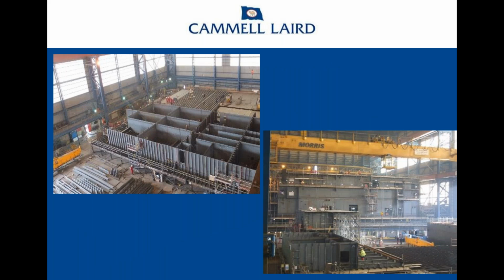And here you can see some of the manufacturing. These are the subunits. In other words, on the left-hand picture, there's where the whole deck's worth, 40 meters wide, remember, is being laid down. And what you see there is the blocks are actually upside down. The flight deck, for example, is very, very critical in shaping on the carrier. So it was laid upside down, and in the end, all this was turned the correct way up, and we can go up to 240 tons. And then, as you can see on the right-hand picture, we stack them to make up the supersized module.